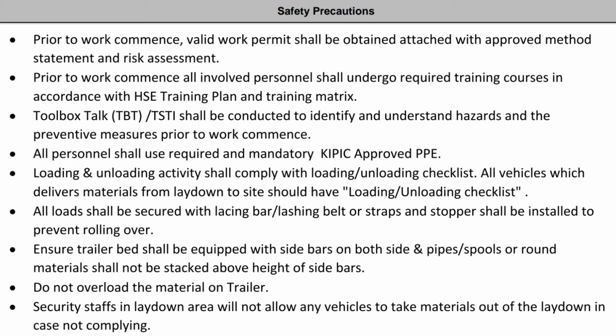Prior to work commencing, a valid work permit shall be obtained, attached with approved method statement and risk assessment. All involved personnel shall undergo required training courses in accordance with the HSE training plan and training matrix. Toolbox talk, TBT, and TSTI shall be conducted to identify and understand hazards and the preventive measures prior to work commencing. All personnel shall use required and mandatory KEPIC approved PPE.